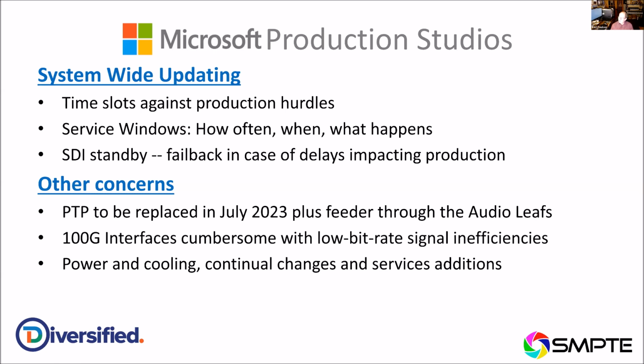So while you're sitting there wondering how you're going to power all this stuff, and there were extension cords running down halls and into other rooms like you can't believe, you cross your fingers that the fire marshal doesn't come in and shut the whole facility down. But we successfully changed almost 100% of the power, got it updated, and probably another 30% cooling had to get added, including UPSs and generator backups.